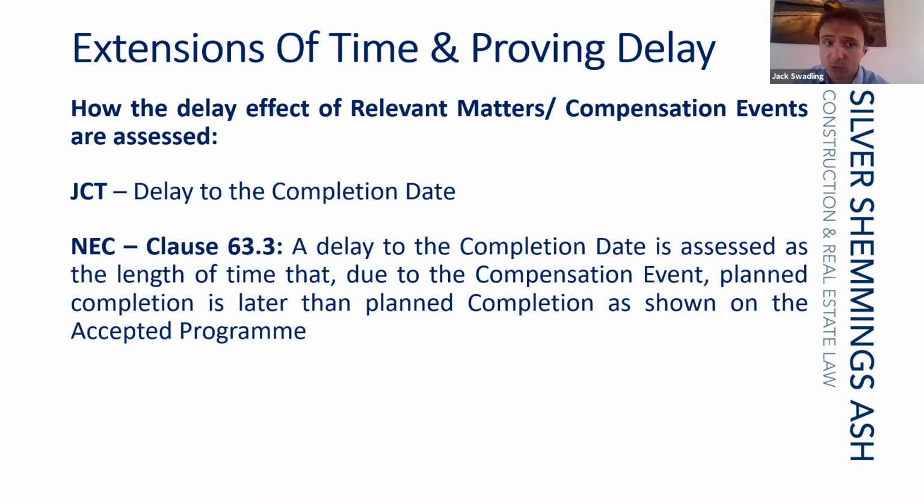The process is all about showing the effect of relevant events on the critical part of the works, so that the event in question is actually impacting on when the completion date can be achieved by the contractor.